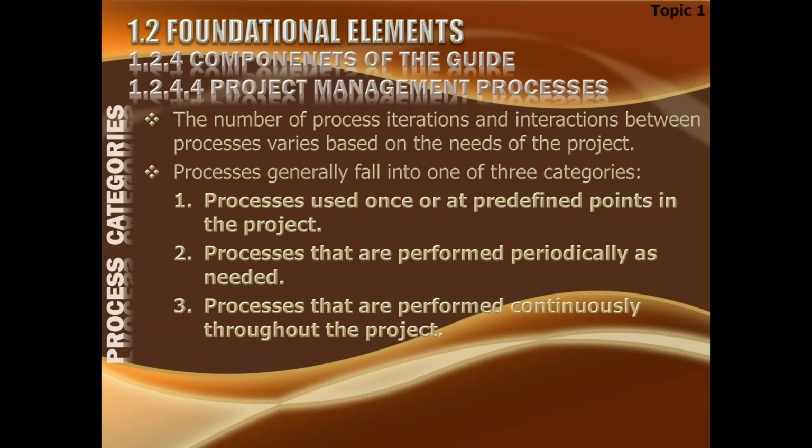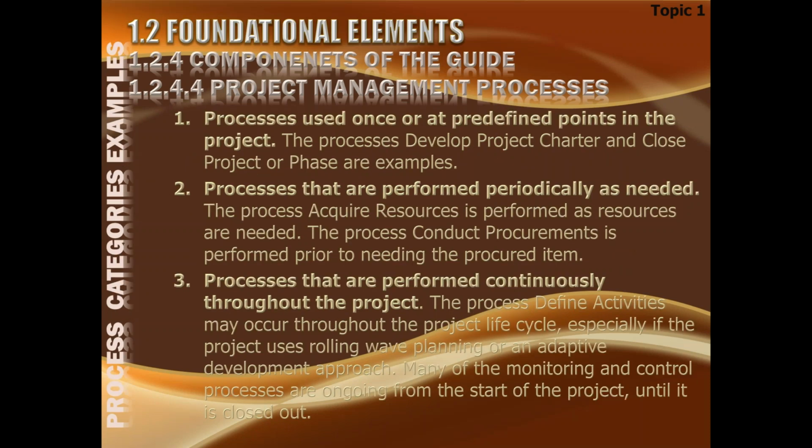You would learn which process is continuous in nature, which is a one-time process, and which is periodical. Processes used once at a predefined point in the project are processes like develop project charter. The charter is developed only once. Or close project. This happens only once.